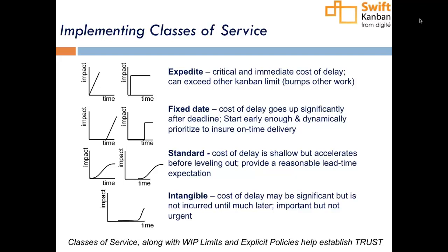What you want to do is take up a certain amount of important work that needs to be done but doesn't have a deadline, and you put a certain number of people working on it. That's your spare capacity. And if something expedited comes in, you take one of these people and move them over to do the expedited work. And when the expedited work is done, they continue on their important work. So the important work sooner or later gets done, and the total resource is being used 100% of the time while keeping the system resilient and predictable.